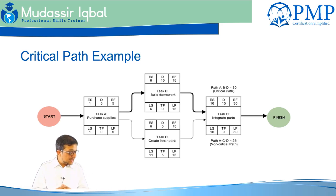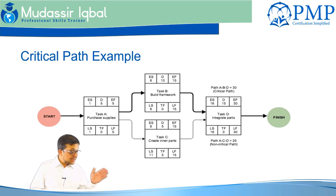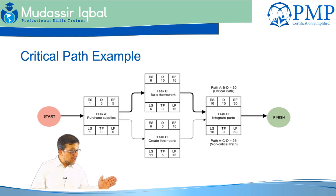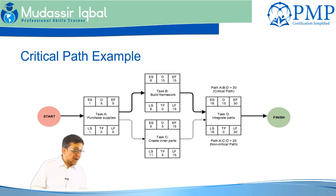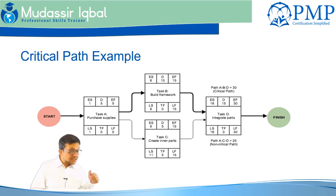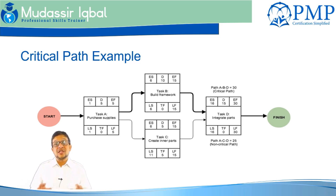In this example, you can see early start and early finish. Task A is 5 days, Task B is 10 days, Task C is 5 days, and Task D is 15 days. The critical path runs through A, B, and D, each having a total float of zero. Task C has a float of 5 days, meaning you can start it on day 6 or day 11, completely based on your preferred logic for the project.